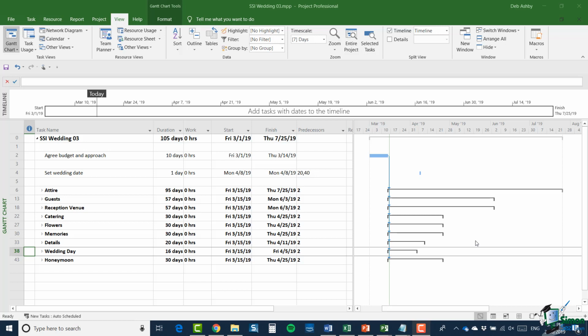They can also be used to show you what's coming up next, what's happening, say, over the next week or so. And very often, milestones are associated with a payment schedule of some sort. So, for example, when a particular point is reached in a project, there may be a payment to make.